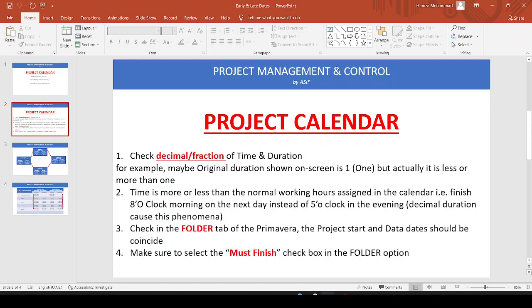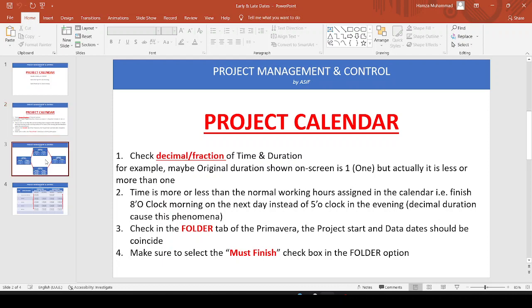We also have to check the timing — the start time of working days and end of working days — to ensure it is not less than or more than the specified time in the calendar. In addition, we have to check in the project folder tab in Primavera that the project data date should be considered for both date and time. We also must make sure there is a Must Finish date specified in the project folder.